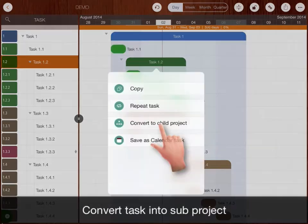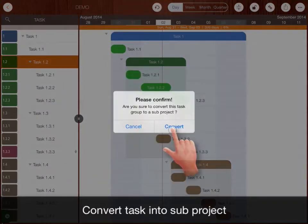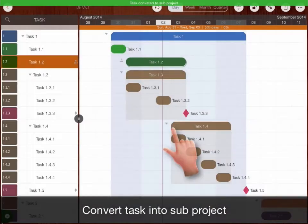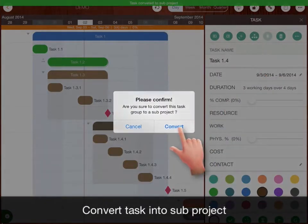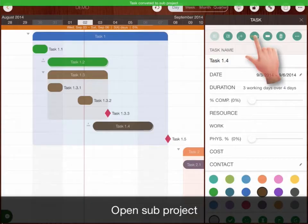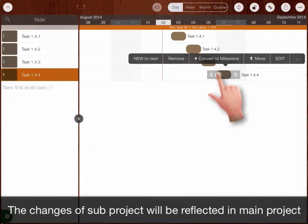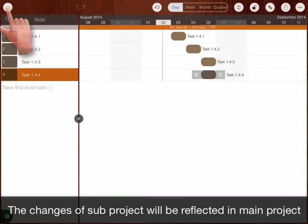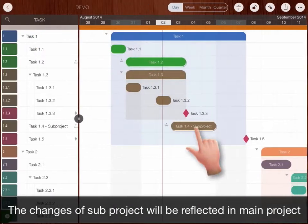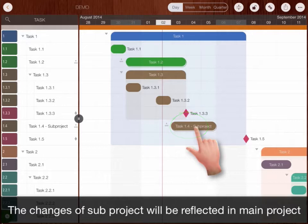Convert task into sub-project. Open sub-project. The changes of sub-project will be reflected on the main project.